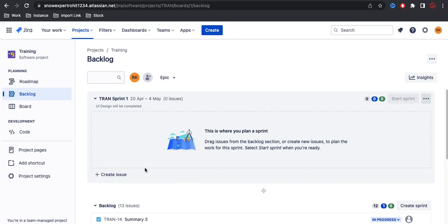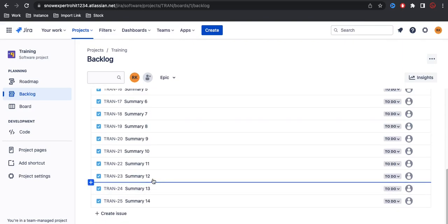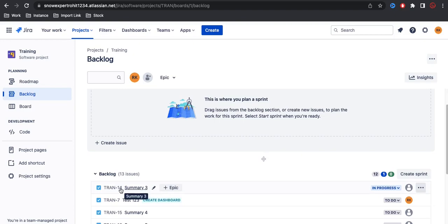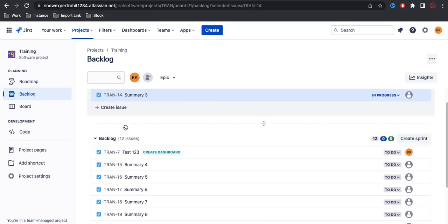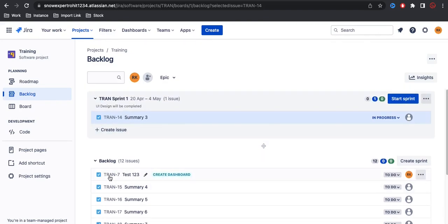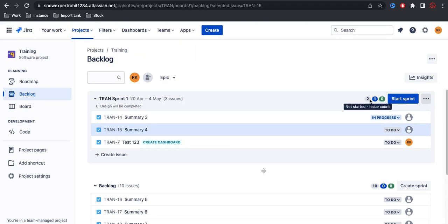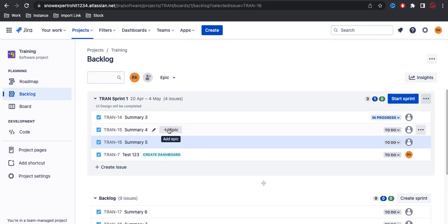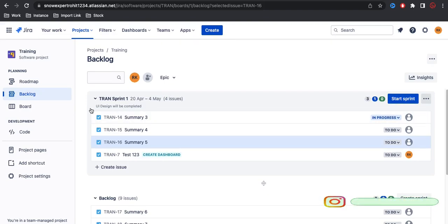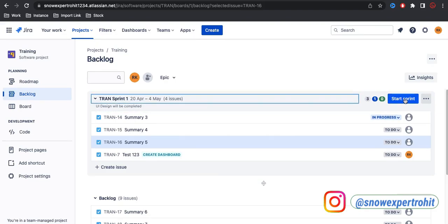Now you can see in this sprint we don't have any story yet - all the stories are in the backlog. We can move any story from the backlog to the sprint one by one. Once we move the stories to the sprint, there is a button called 'Start Sprint' where we can actually start the sprint. Notice the numbers - for example, two, one, zero - denoting how many stories are not yet started, how many are in progress, and how many are done. We decided to add four stories to the sprint.